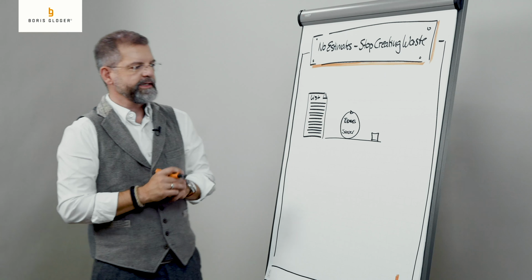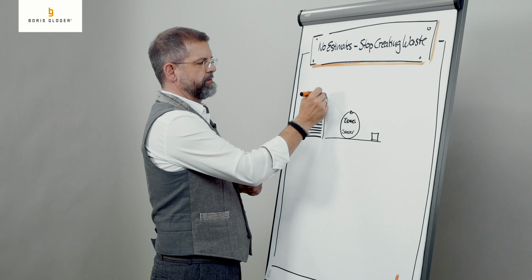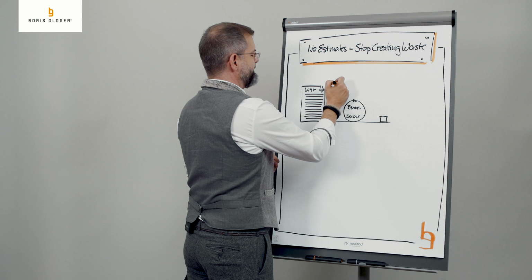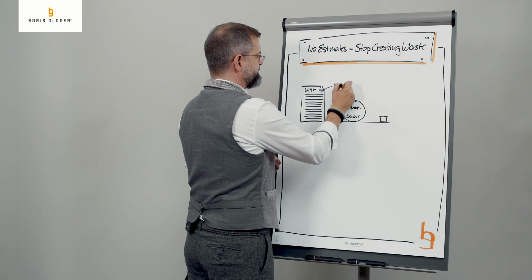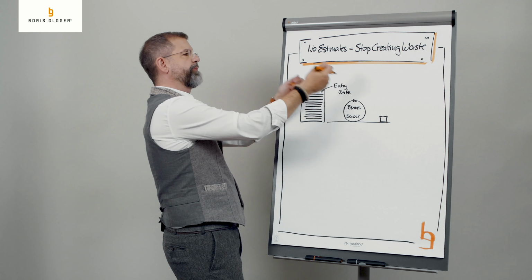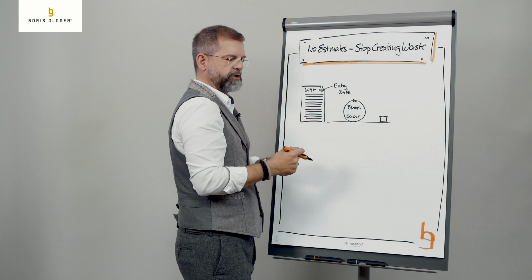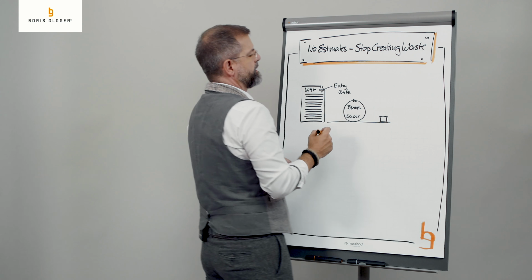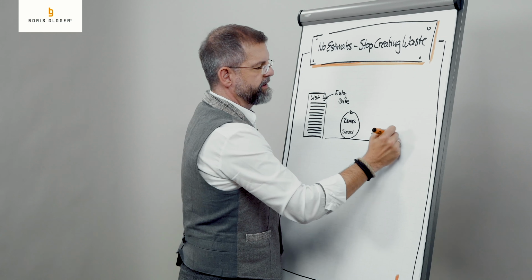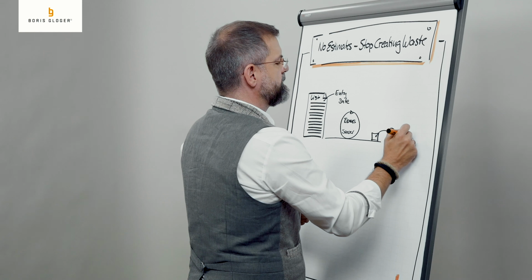Then a very good idea is to note on a spreadsheet, very first, the entry date into that list of that specific feature. So whenever you put something into that list, then you write on that feature or project your entry date. And if you have delivered that feature or project, then you write on that feature in your spreadsheet the delivery date.